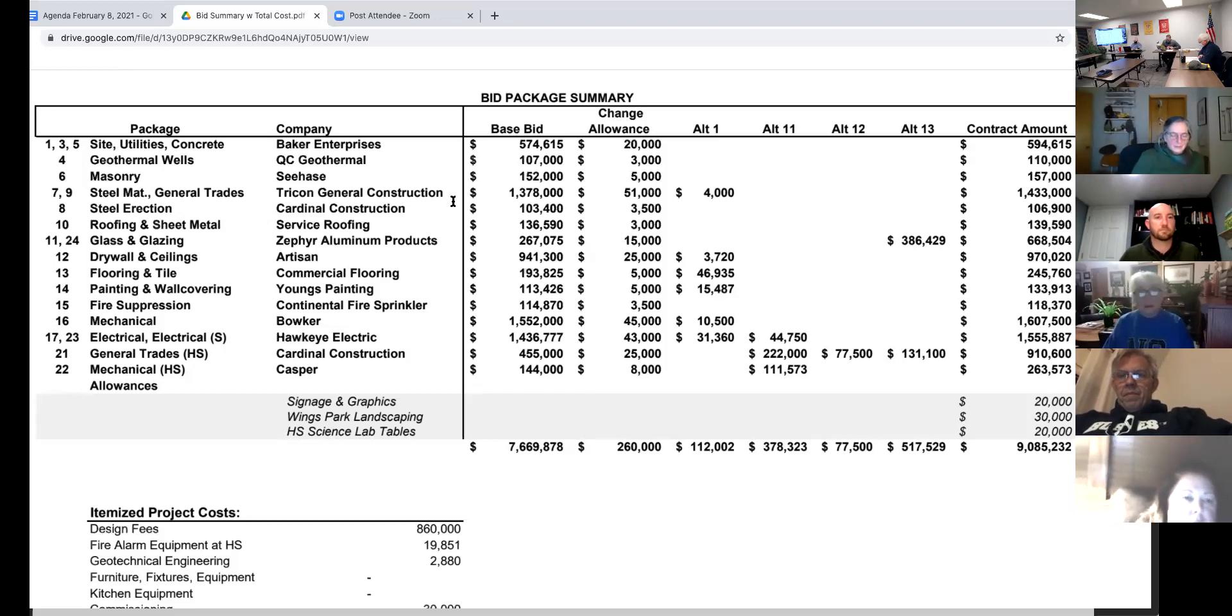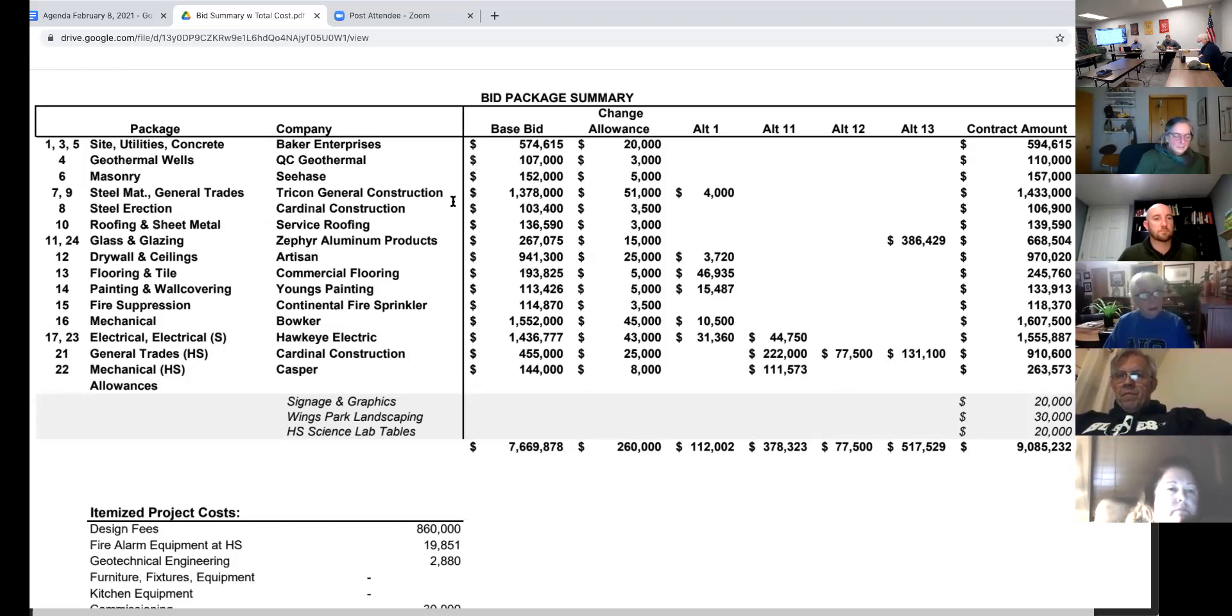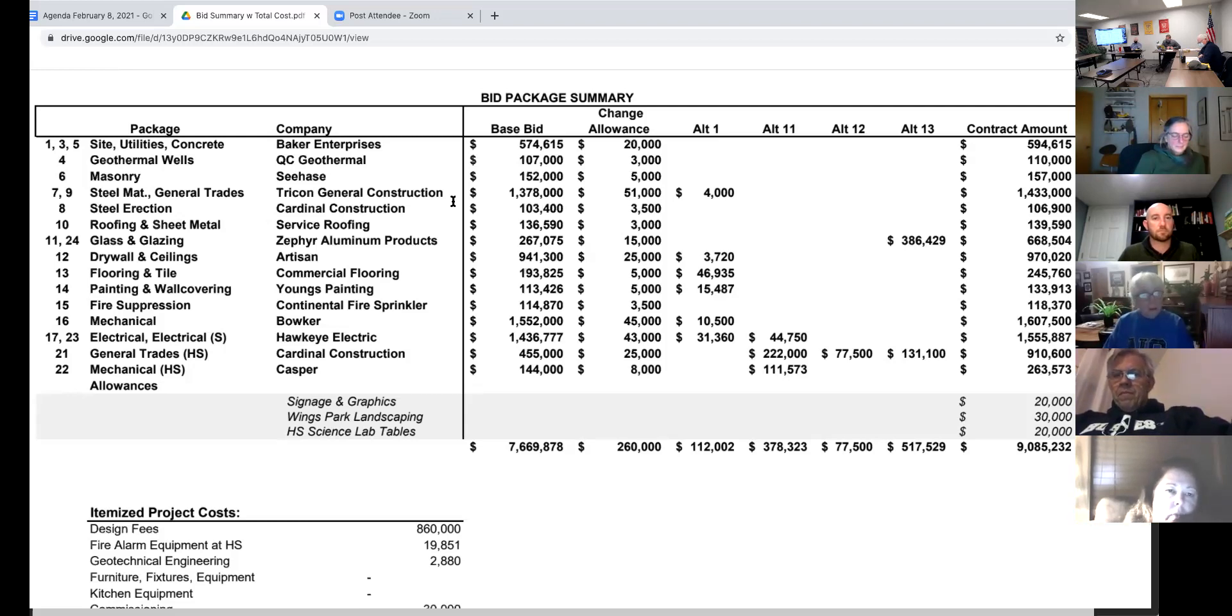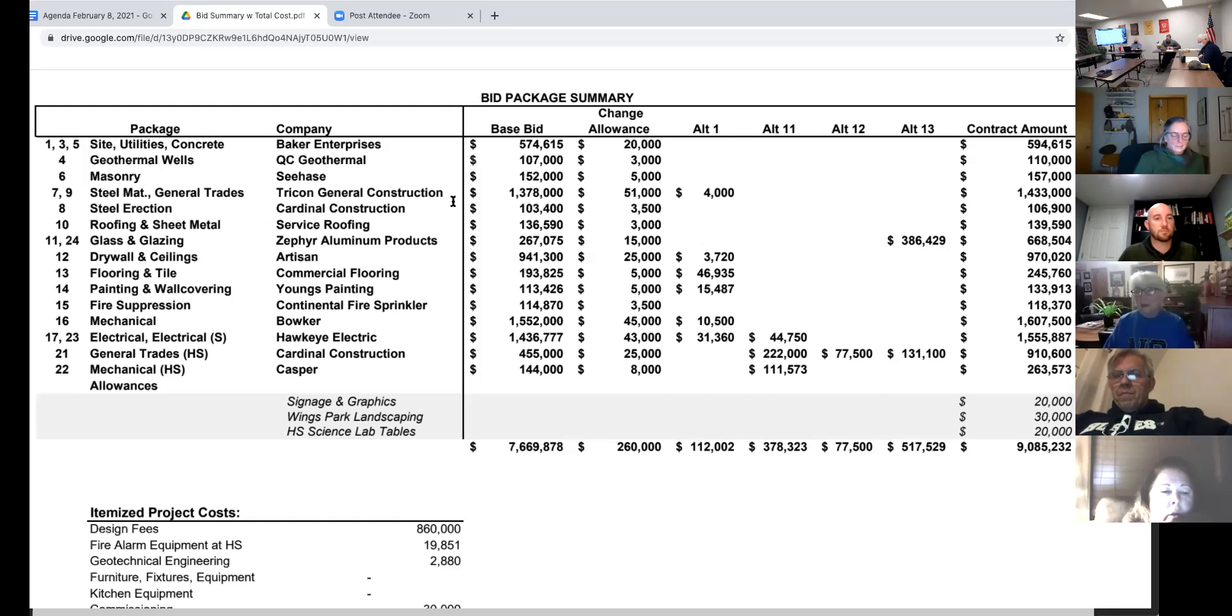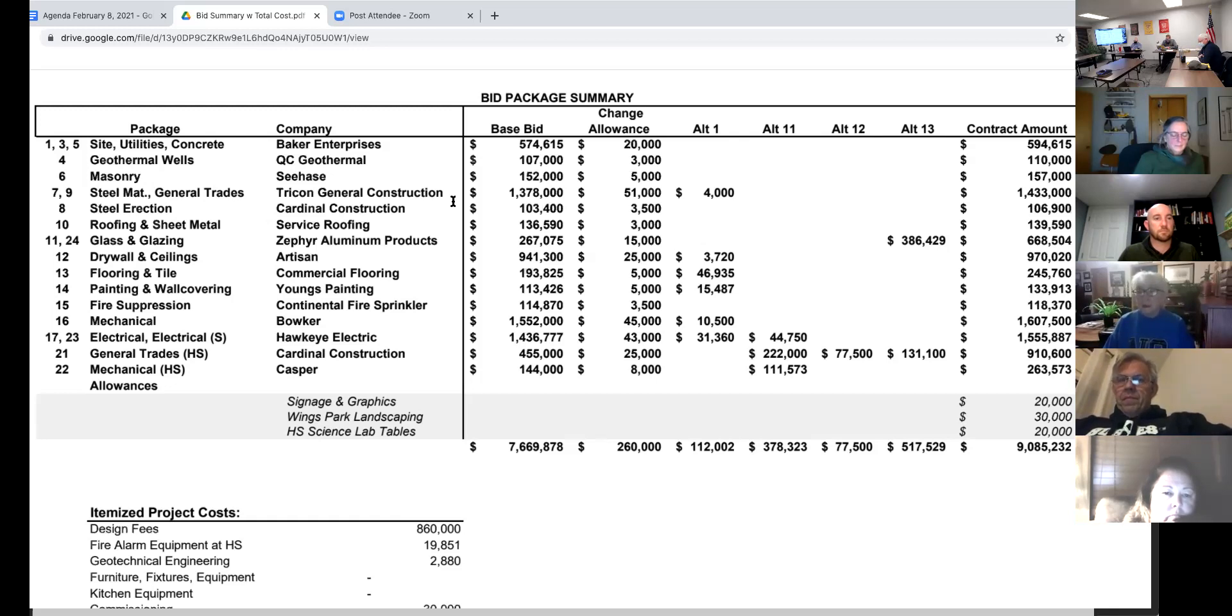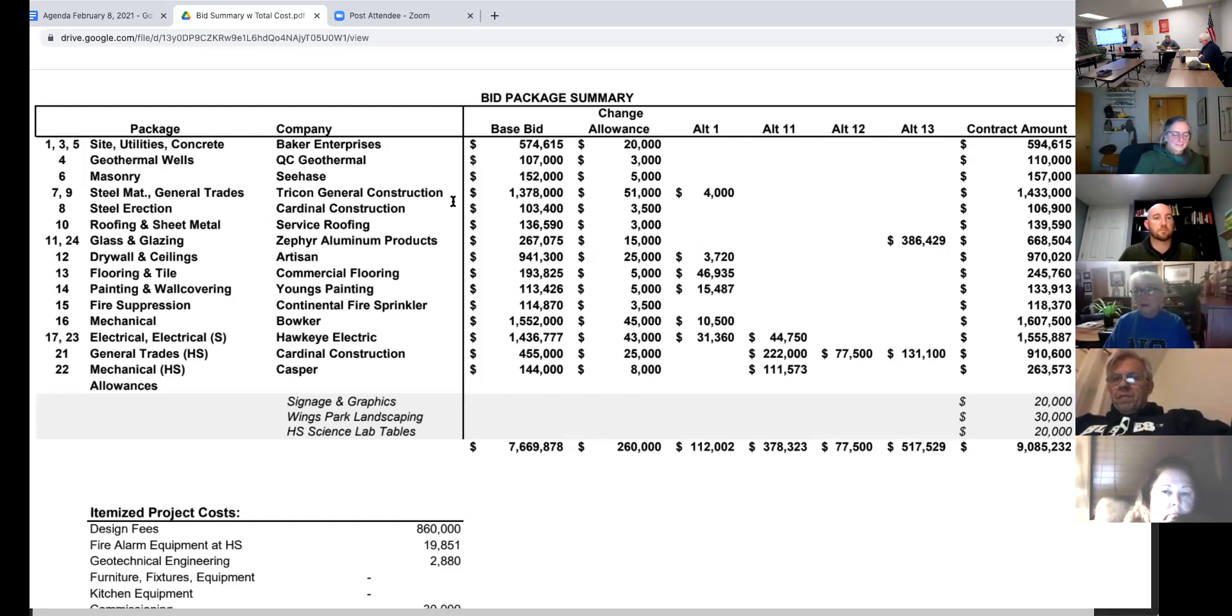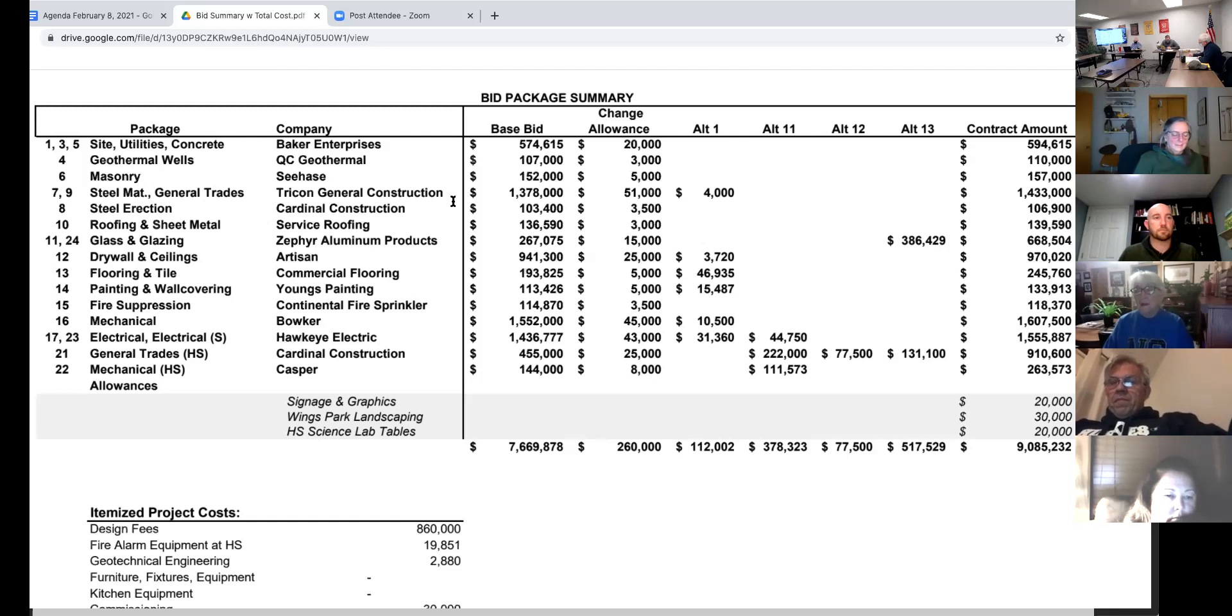So with that presentation and all the work that's gone into this, one of the points I'm excited about with the contractors, if you'll notice, that we have different general contractors for the high school project and for Wings Park. I think in the current construction labor market, that's going to be to our benefit to have multiple contractors working on separate projects in our district. It should increase productivity and decrease slowdown if they would have to be pushing labor from one project to the other to keep them both moving forward, especially with a hard deadline of trying to get into the high school before the school year starts. So I think it's going to be really important that we have those separate contractors, and it was to our benefit that the bids came out to be low opposite of each other, that we can utilize both those teams. So with that being said, I'm super excited about how all this turned out and strongly recommend that you accept the bid packages and the contractors that are presented tonight by Boyd-Jones, and also accept bid packages 1, 11, 12, and 13.